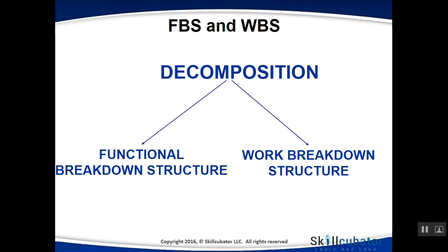Now, when I talk about the FBS, functional breakdown structure, we're talking about the product scope. Whether you're building an application, software, system, or any other tangible product like a mobile phone or a gadget, or even an intangible thing like a service, you start with a high level scope of the product and you start breaking it down into a much more finite level of features or requirements. That's basically the FBS.